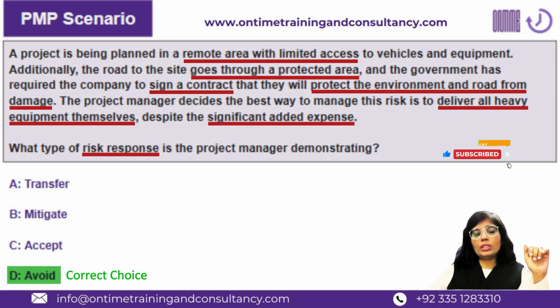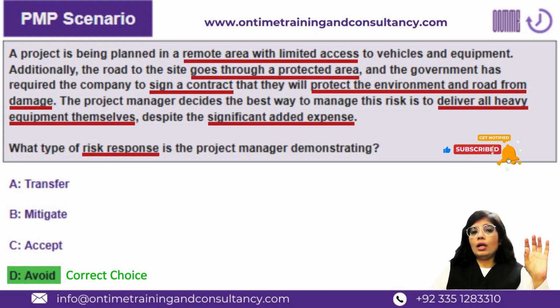So he thought of managing this risk by delivering all the heavy equipment by themselves, so that they make sure the equipment is there with all those constraints imposed by government with respect to that locality. And that, of course, added to cost.